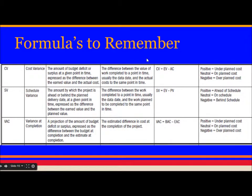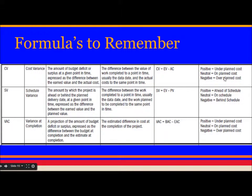Formulas to remember: Cost Variance (CV) = Earned Value − Actual Cost. Schedule Variance (SV) = Earned Value − Planned Value. Variance at Completion (VAC) = Budget at Completion − Estimate at Completion. For interpretation: if CV is positive, you are under planned cost; if negative, over planned cost. If SV is positive, you are ahead of schedule; if negative, behind schedule. Similarly for VAC.